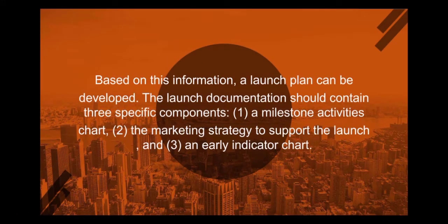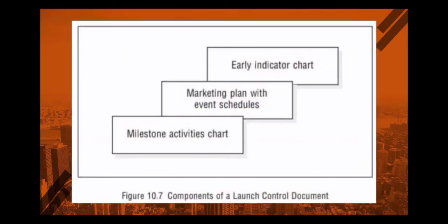Based on this information, a launch plan can be developed. The launch documentation should contain 3 specific components. 1. A milestone activities chart. 2. The marketing strategy to support the launch. And 3. An early indicator chart. All of these guide the launch and early commercialization.